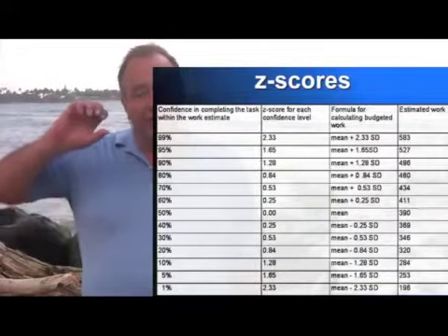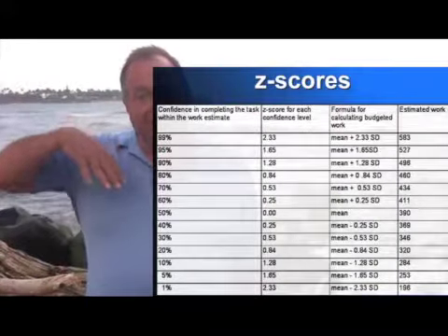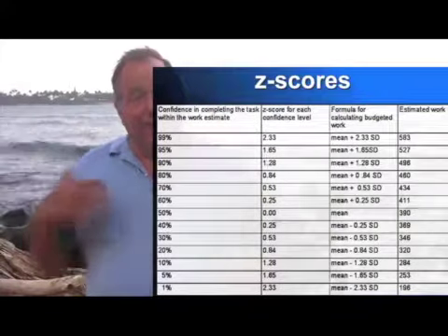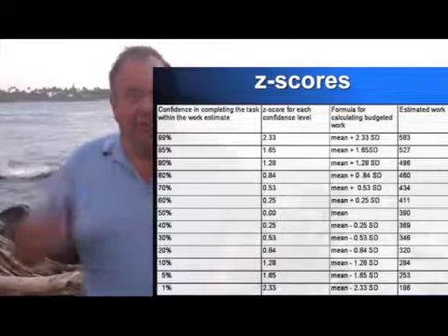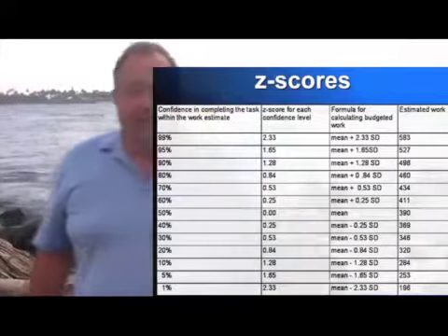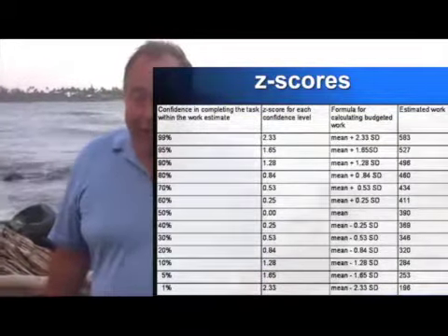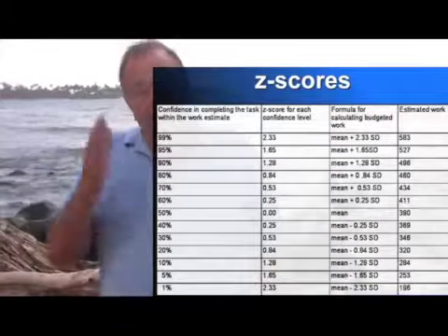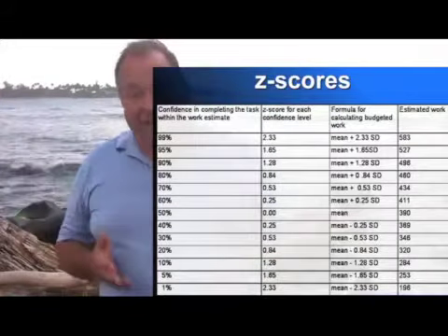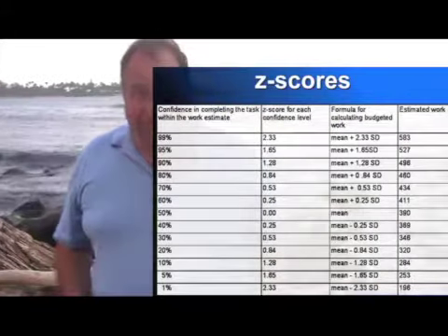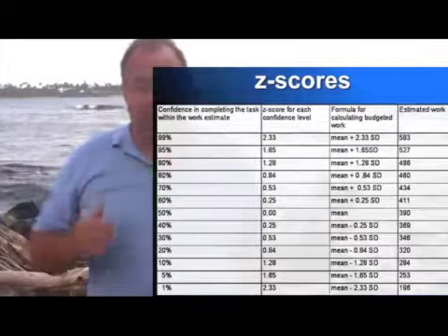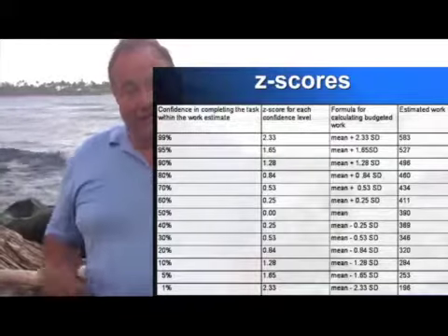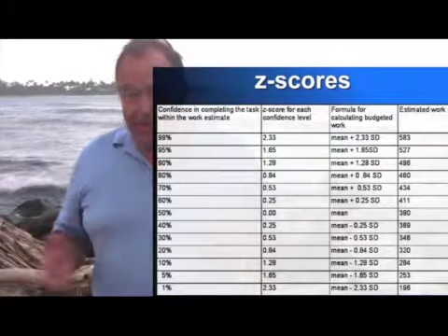And we can use that kind of statistic to give our project sponsors a sense of the risk in each task. And when they say to us, I want to be 100% certain we finish this on time, we say to them, well, that's going to take a very high work estimate because we've got to cover a lot of the tail end of the curve, but you can actually give them data. And here's the estimate, and here's the duration of the project when we're 60% certain of finishing on time versus 70% versus 80 versus 90. And with the PERT numbers, you have all the data to make those estimates.